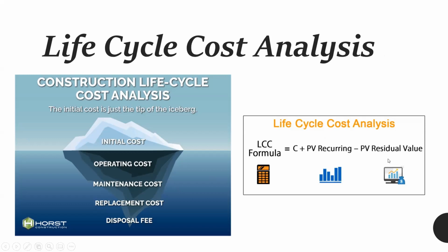Minus, at the end of the period, we might sell that particular product. For example, let's say you are buying a vehicle for your construction company. At the end of another 5 or 10 years, you might sell it to someone who buys it. In that case, it is a residual value. At the end, it will not be a cost; you are selling it and making some money. So that money should be subtracted from these costs. Even though that particular good or service is valued at a certain amount by that time, it will not be the actual amount if you convert it into the present value. Therefore, we should identify the present value of the residual values as well.